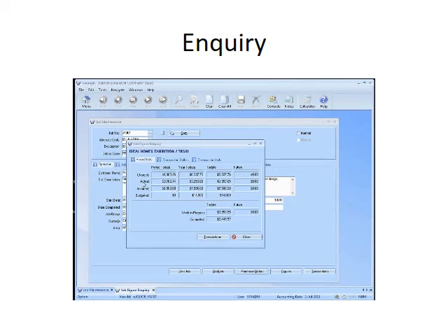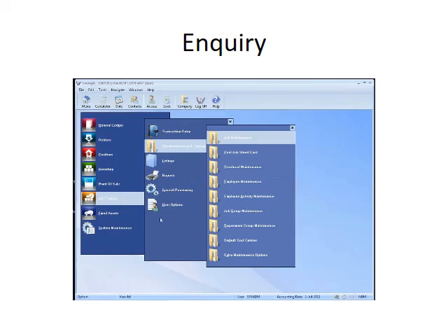That comes back to what was invoiced. The actual cost of what's been incurred on a job, you then do get a list of what was invoiced, and invoiced can be different to charged again, but this is actually what's been raised as physical invoices. You've also got what's been budgeted for the period. You've got work in progress, so you can have work in progress for the year, and this is what the asset value is. Committed is a list of your purchase orders. You'll see there's a gap here which I haven't turned on, and maybe I'll just go and turn that on.